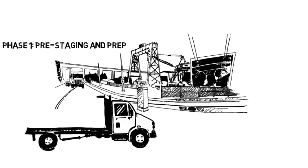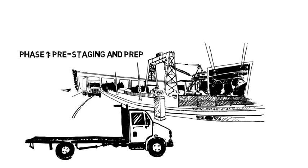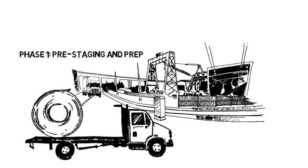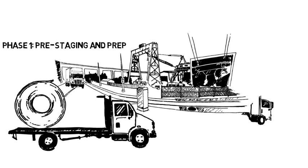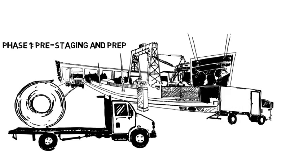The tram team will complete as much prep work and staging in both the lower and upper terminals prior to the arrival of the International Maintenance Crew. Watch for closed off areas near both terminals for equipment staging, the arrival of big equipment like shipping containers, scaffolding, and cranes.